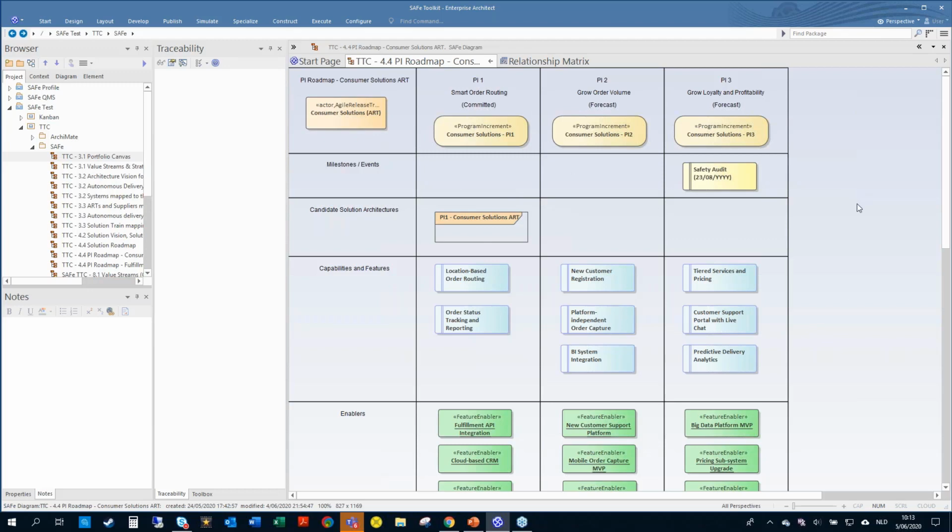That happens for each ART, and every PI, the 3-month period, is being broken down in sprints. And in that context, you're going to participate in that planning, the PI planning, which is a really interesting event, a 2-day event that is there, also called the big room, that yields those prioritized things and empowers the teams to start realizing those features.